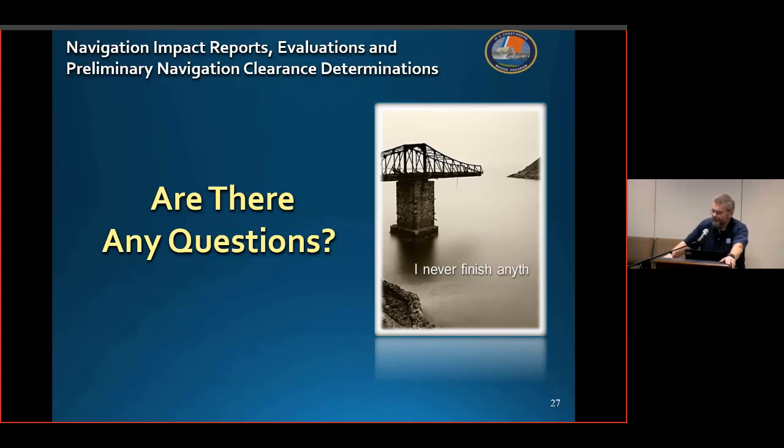Well, generally, you're going to be talking to harbor masters. You're going to be talking to waterway users. You'll be talking to any businesses along the waterfront. What sort of commercial users use it? They have tug and barge traffic utilizing the waterway, if you're talking about major port authorities. Visit local marinas. If it's a smaller waterway and it's mostly recreational traffic, visit the local marinas.